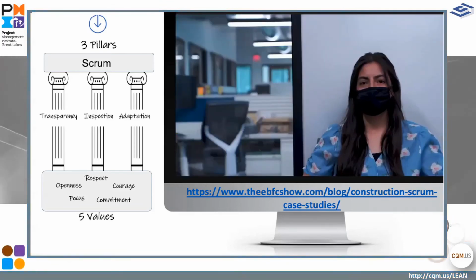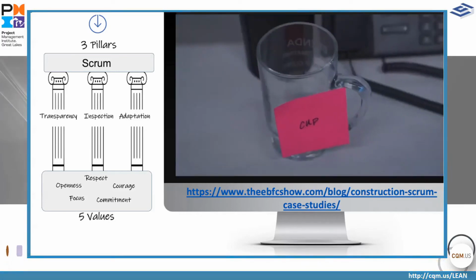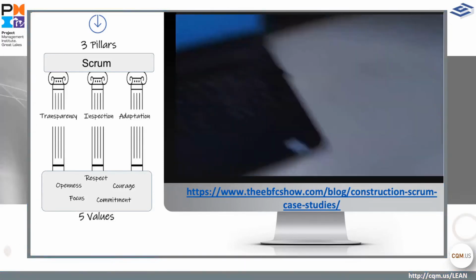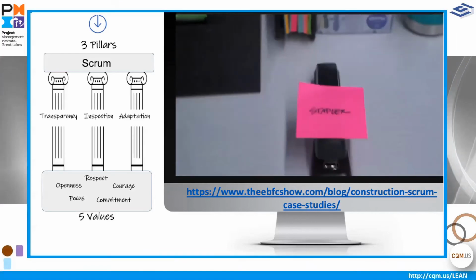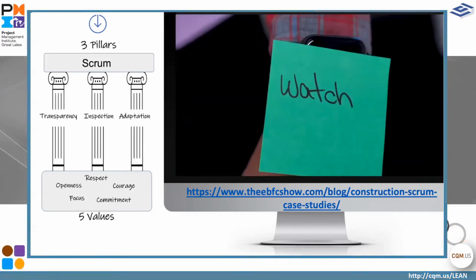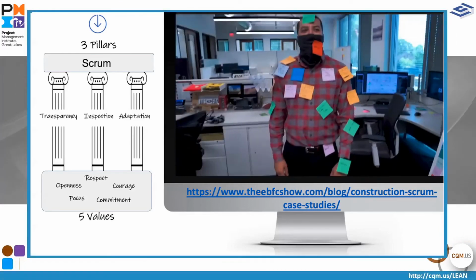We create tags for all of our work, whether it's on a specific project, a personal project, or for training. If it takes longer than 15 minutes, we create a tag for it. There's lots of stickies being used. We create a tag for everything.